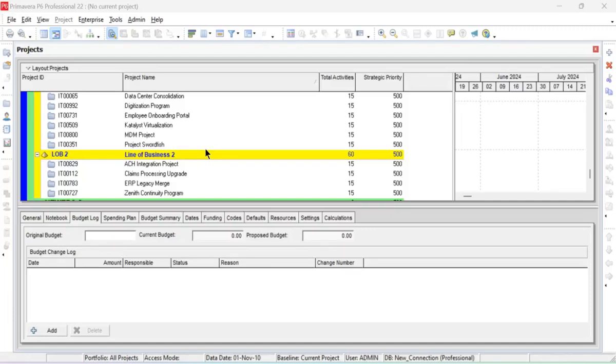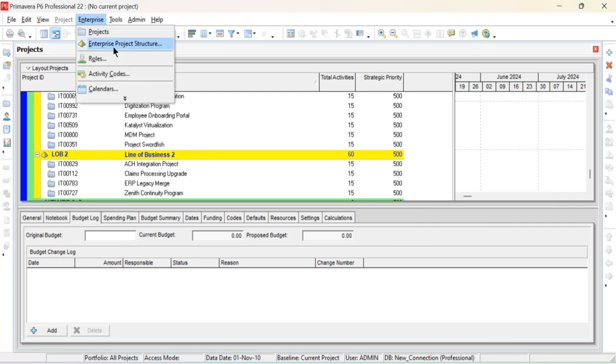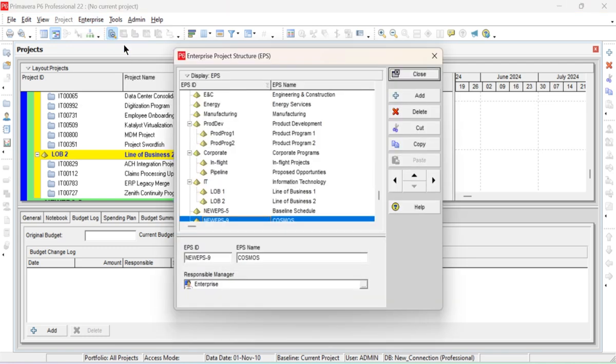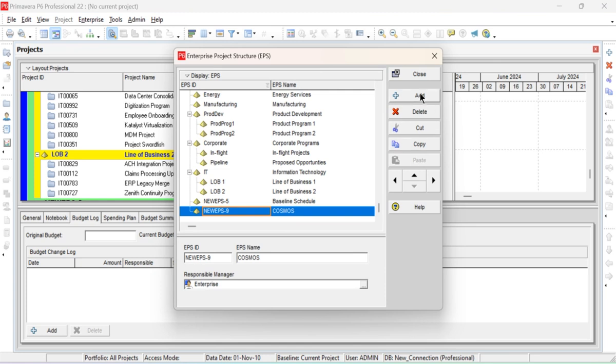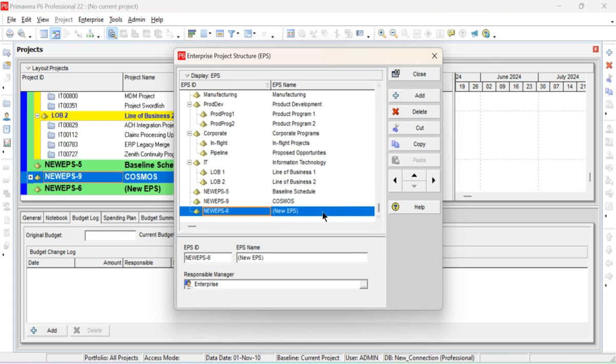In this video we will talk about EPS and project in P6. We will go to the enterprise, then enterprise project structure, we will click here, then we will add new one. We will give the company name. EPS means your company name, like our company, building construction company.